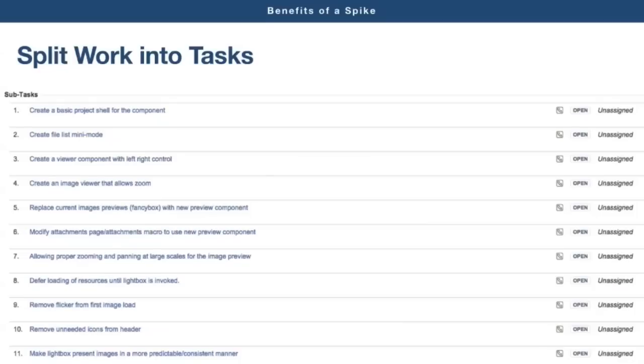So that's what you're supposed to be striving for, an end-to-end solution. And in order to do that, specify deliverables, the most important thing. Just go back and see what needs to be delivered in the spike. And for the person who implements it, go back to the deliverables every so often, just to make sure not to concentrate on something that is not part of the deliverables. And put the demo as part of the deliverables, because it's really important, especially for visual spikes.